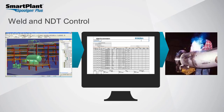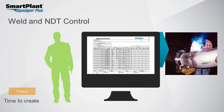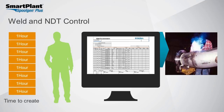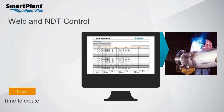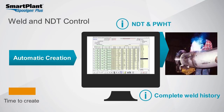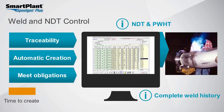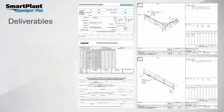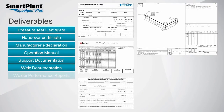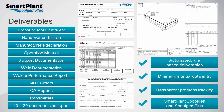That's what happens today with welding and non-destructive testing. SmartPlant SpoolGen Plus allows automation for all the manual hours specialists spend documenting. Using rules programmed into the system by the specialist allows automatic creation of large amounts of documentation, a clearer history of what was done, and a clearer view of progress. This allows the fabricator to meet obligations, track progress, and provide traceability. The documentation for a single spool can be quite overwhelming — experts report that 10 to 20 supporting documents per spool have to be created, in addition to the spool drawing.